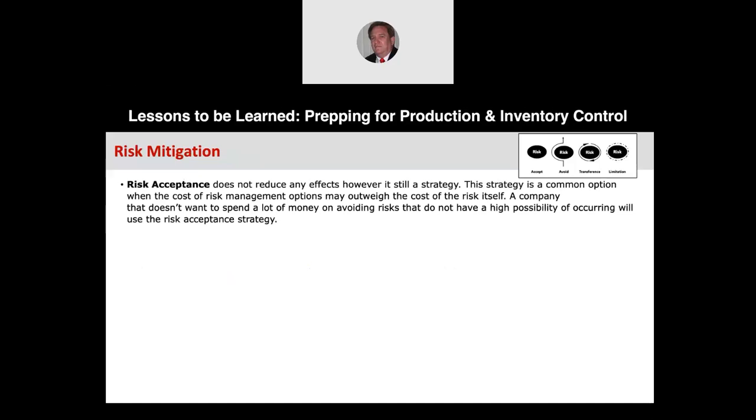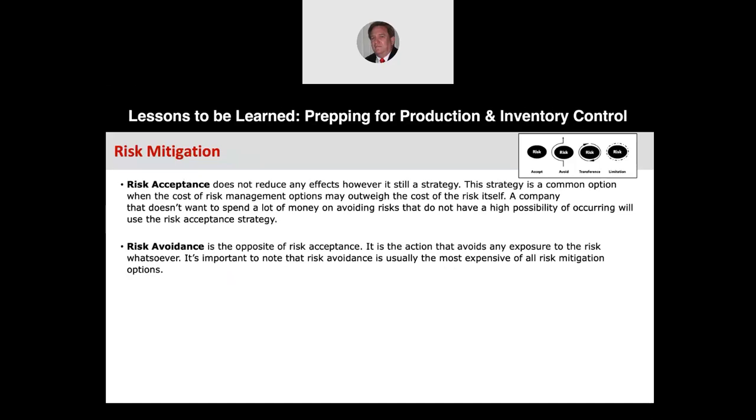Risk acceptance is where you really don't do anything. It's kind of a poor strategy, but if the cost of risk management outweighs the cost of the risk itself, then maybe you just say, hey, it's a part of life, part of business, and I'll just accept the risk when it comes. So really, this is a cost factor: cost versus risk. If you think the damage the risk would cause is not that much, then you just accept the risk, and if it happens, it happens.